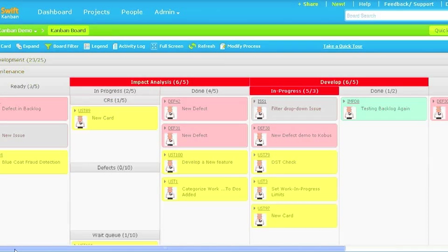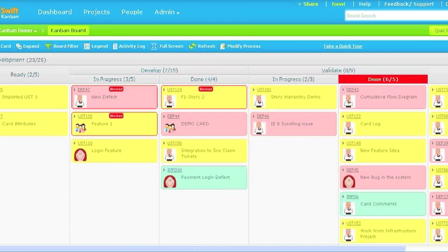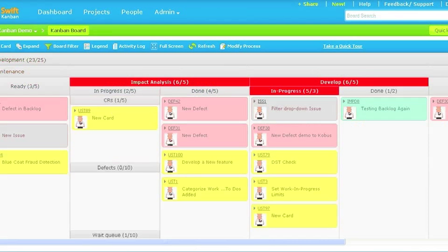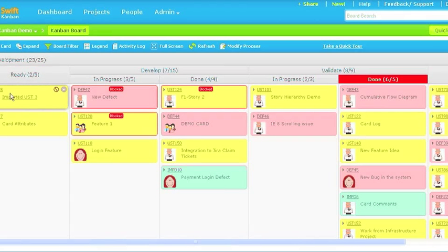And so each lane can have its own value stream or workflow that lets you define exactly what kind of work needs to be done and how that work needs to be done to deliver the specific category of work. As you can see, each of the value streams and each of the columns and the lanes also provide you further information. So first of all, besides the name, which can be customized based on your own value stream, you see the numbers that are next to them, and the numbers indicate the WIP limits for each of the columns that you see on this particular value stream.